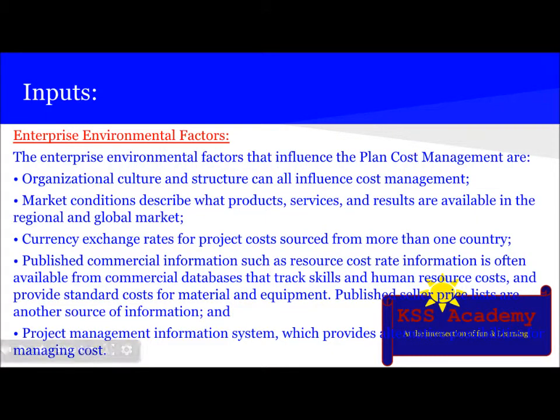The next input is enterprise environmental factors, and for influencing Plan Cost Management, the following are used. Organizational culture and structure can all influence cost management. Market conditions describe what products, services, and results are available in the regional and global market. Currency exchange rates apply for project costs sourced from more than one country.